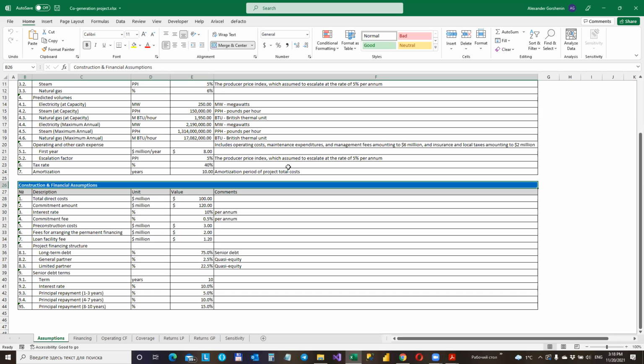113 million, and the total project cost is sensitive to the interest rate applicable during the construction period. So if the interest rate is higher than expected, project cost increases accordingly. The higher project costs require a larger amount of permanent financing. The sponsors of a project can eliminate their interest rate exposure by arranging interest rate swaps.